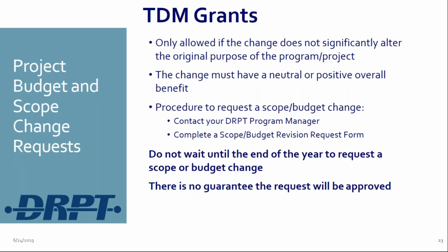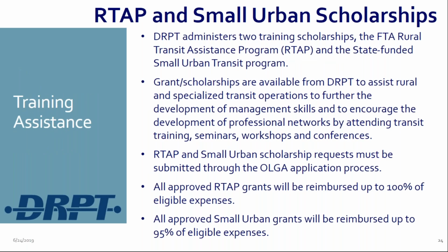So for the TDM grants, I hope the TDM program managers were paying attention to Todd, because I really can't add much more to what he said. We, on our side of the shop, pretty much follow the exact same policy. So make sure that any changes you do have aren't completely new activities or something completely out of the quote-unquote scope of what your work plan was. We will scrutinize something like that a lot more and probably not allow it. So any 180-degree turns to what you said you were going to do will probably not be approved unless there's really, really good reasoning behind it.